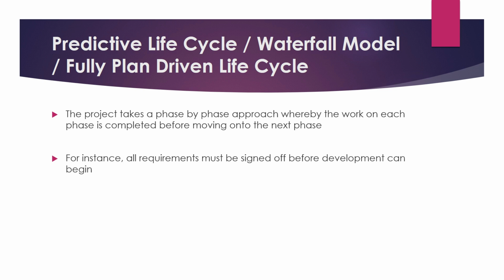We just discussed the different phases of the project, right? Initiation, planning, execution, closure, monitoring and controlling, which is common throughout. Initiation needs to be completed 100% first before we can move on to planning. Planning needs to be 100% complete, signed off by all the stakeholders before we can move on to execution. That's how the waterfall model works. And of course, in the end, the outcome is the final product. So you get the final product in the end.